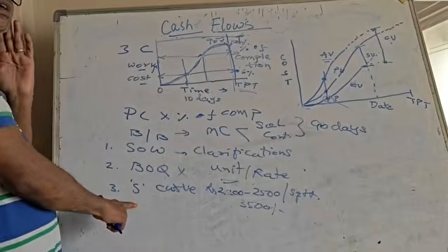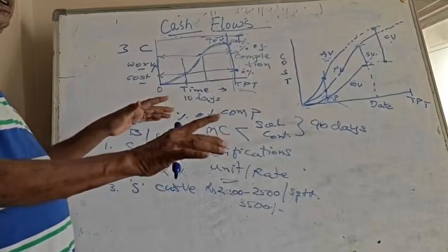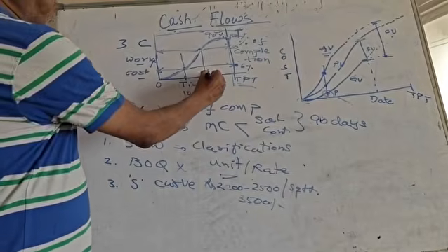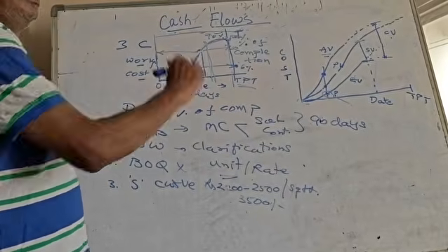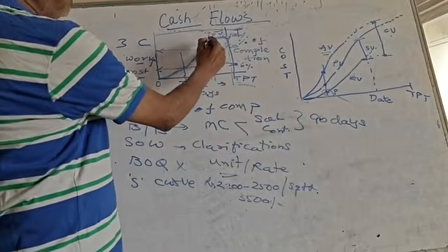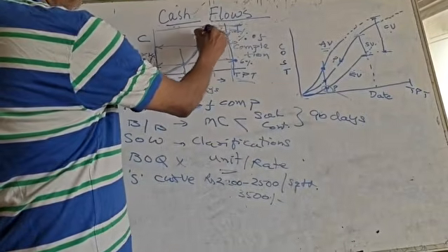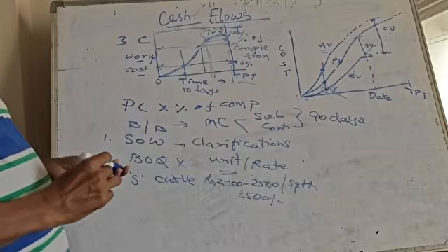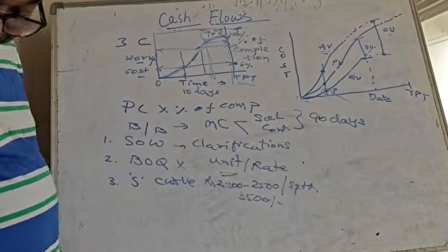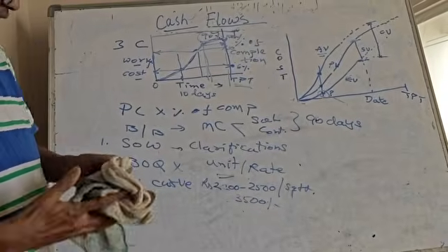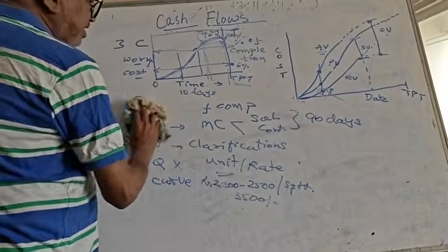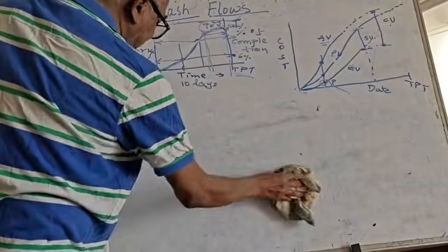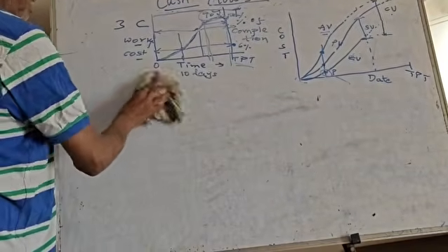With S-curve, you can do it sitting anywhere, even in your office, you can sit and you can control, and ask the people to go and just cut a line and then work out whatever be the percentage of completion here. And this 90% is already written initially in the tender document itself, so you need not work out that one. Now I am going to the next most important topic, based on which we work out the project costs, and that is called the cash flow.